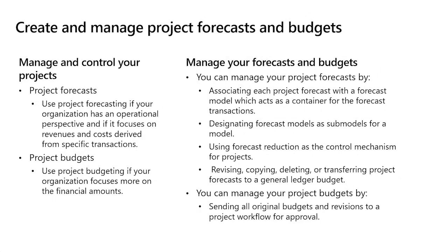Now, you would use project forecasting if your organization has an operational perspective. So if you're going to be focused on revenue and costs from specific transactions, this is going to be the right approach for you. On the other hand, you should use something called project budgeting if you're going to be more focused on the financial amounts. Either way, both project forecasts and project budgets use the forecast model to hold the projected transaction amounts.